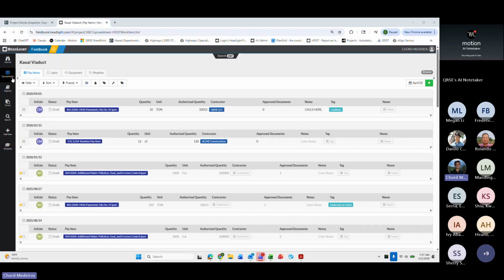Later on down the line, I hope that there isn't any litigation, but if there is, this daily documentation will be of the utmost importance. And then just additionally, in order for any payment to be justified, the diary information needs to line up with it. And if the diaries are lined up a certain way, then obviously there will be less calculation and justification that you'll need to do. You'll be able to directly take it from the diaries, and so on and so forth. So it all starts with the diaries.